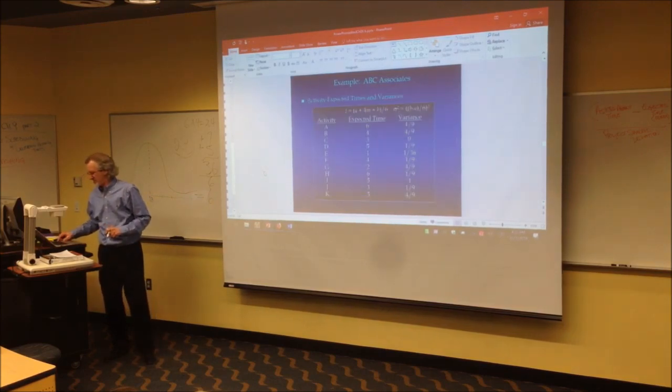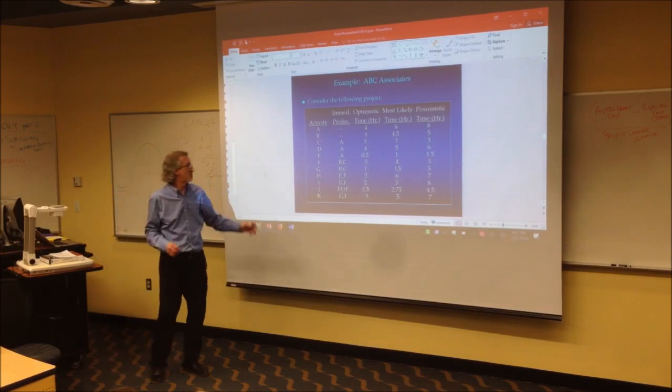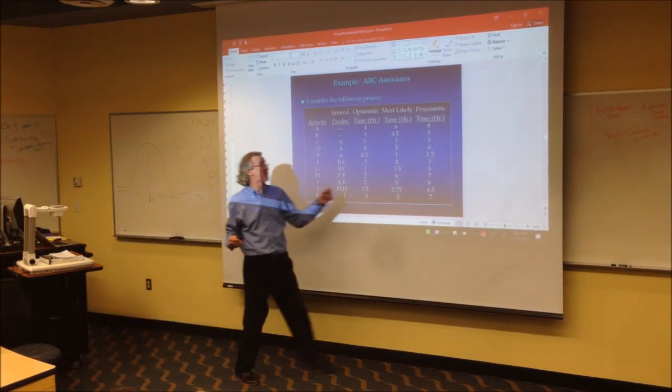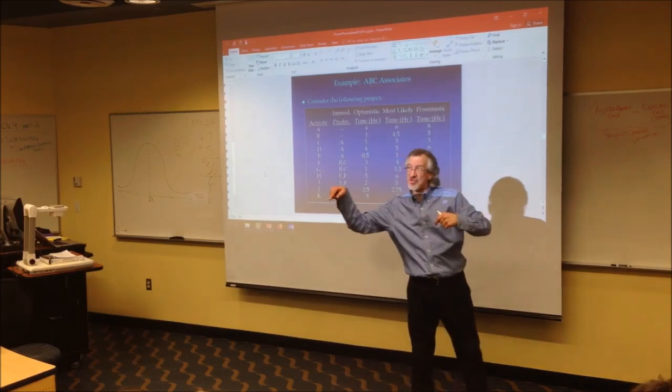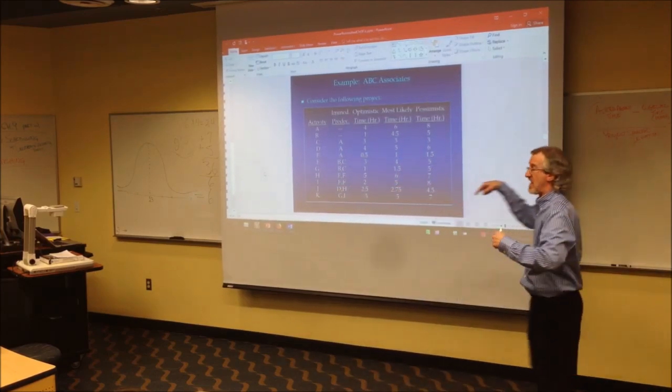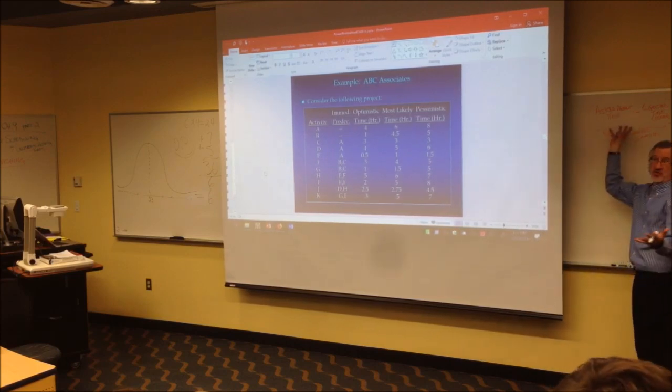Going back to right here, same activity, we'll do H. It says you take the longest amount of time, which is the pessimistic time, subtract the smallest amount of time, which is the optimistic time. Here it is. This is what you should have written down.